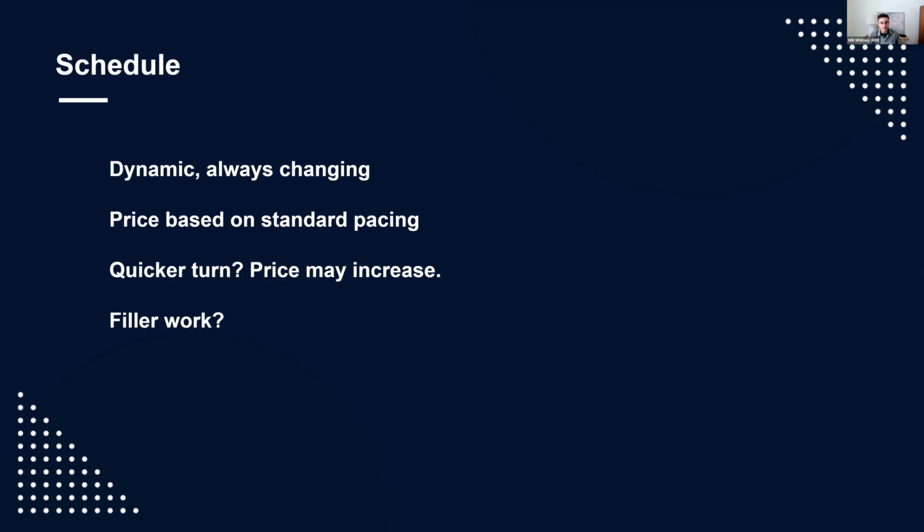On the opposite end, if you have what we call filler work, like I have 1,000 boxes, we say, all right, it's going to be X cost for an 8-month project. You say, you know what, I don't need this, you can do it anytime within 2 years. You may get a little bit of a lower price. If we say, okay, so it's filler work, if I start this, I don't need to be done until 24 months from now.